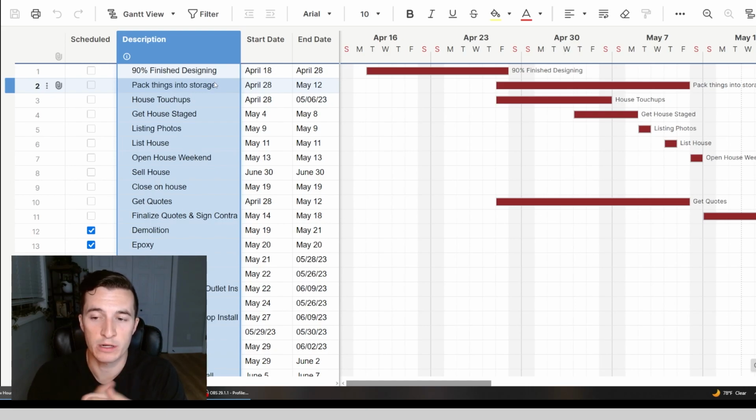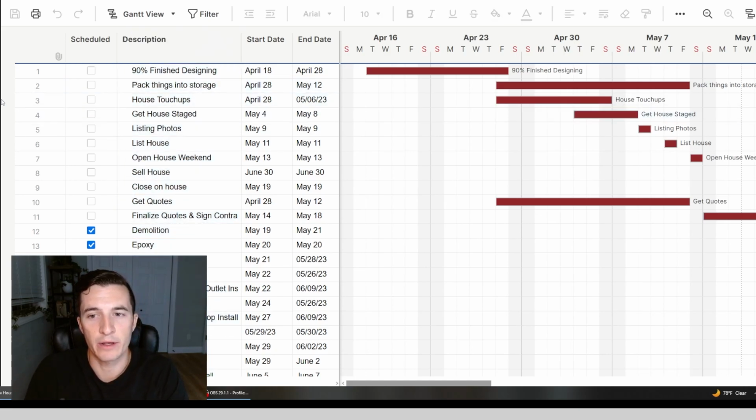I know how long it will take me to design this house. I get quotes and estimates and ask my contractors how long they think it's going to take them. And then when I get their quotes, so say they say it's going to take 5 days, I'll actually give them 9 days, maybe 8 days, depending on what the trade is doing, or how many people they have, or how confident they are in the job. I always like building in a little bit of buffer space, so that if a schedule runs long by a day, because unexpecteds always pop up, I don't have that framer get pushed back a day or two, because that could mess his schedule up. Especially if he's stacking jobs.